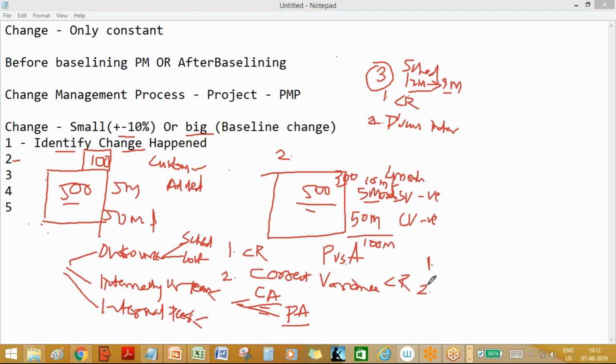Okay, so you will give options. One of the options you gave is from 5 to 10 months. This is the revision you want. Or you can give a revision: from 5, I will take 8 months, but a little lesser on scope. So in the 8 months you want to give the most important features. That also can be an option, right? And the third option is from 5 to 12 months. If I'm able to take the whole scope, then I will go for the third option.